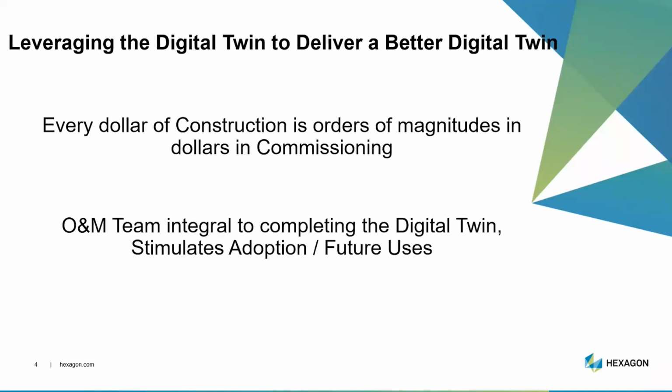By working with them hand in hand, they started to see how, I'll use the term, we make the sausage. And they realized, wait a minute, can we do some of that? And so we started to teach them how we do some of what we do in building a digital twin, and they started to run with it. They started to bring to the table things that we would have never thought of, additional enhancements that, had we waited to hand over and then they asked for, might have been expensive to incorporate, but were really very easy to do at this stage of the project. Adding another column of data to something that you haven't yet published is pretty straightforward.